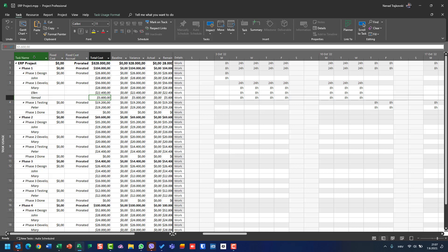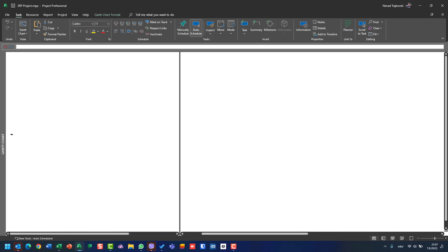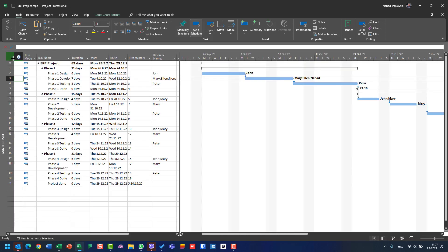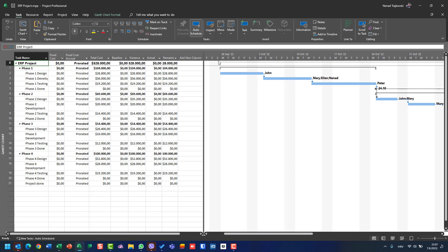If I apply Cost on the Gantt Chart view — right-click, use Gantt Chart, choose Cost — you will see that I have the same information, but since we are looking at Gantt Chart view, I have no resources here. I can see the total cost for Phase One and the total cost for each task in Phase One, but I can see no resources.